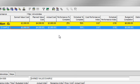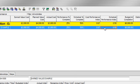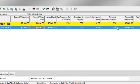Another way to interpret that is to use the schedule performance index. The schedule performance index is calculated by dividing my earned value over my planned value. So in this instance, it's $2,000 divided by $4,000, arriving at an index of 0.5.